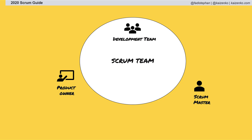Instead, it created an us-versus-them behavior between developers and the product owner. The developers felt they were working for the product owner as opposed to collaborating with the product owner. The 2020 Scrum Guide addresses this misunderstanding by dropping the term development team and replacing it with just developers.